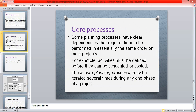For example, activities must be defined before they can be scheduled or costed — no activity can be started before it is scheduled for time and cost. These core planning processes may be iterated several times during any one phase.